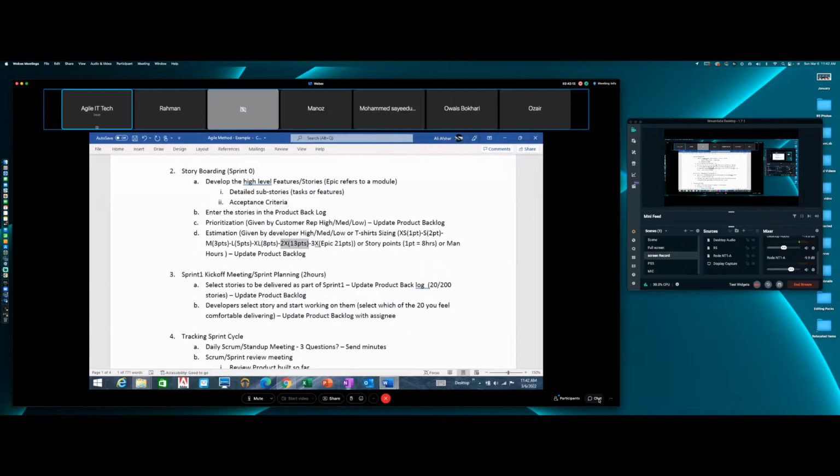You understand? If this task was sitting at 13 days, for 13 days, when you ask that guy every morning, Sayed, what are you doing? What were you doing yesterday? I was working on this story. What are you doing today? I'm still working on this story. Any issues? No. Next day, what were you doing? I'm still working on that story. Any issues? No. Next day, what are you doing? I was still working on that story. Well, the story continues. For how many days? If Sayed was working on this extra large for 8 days, he can give me the same answer.